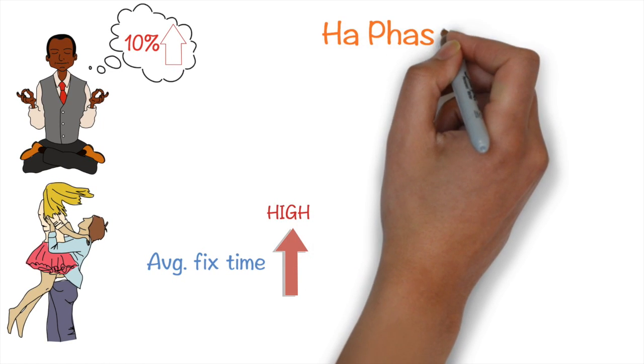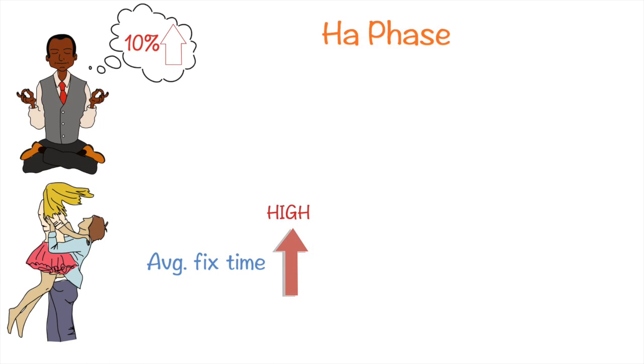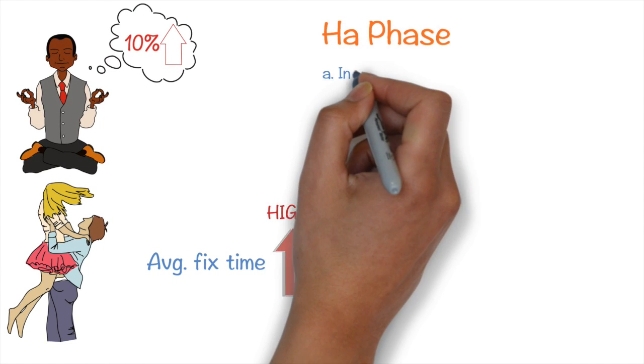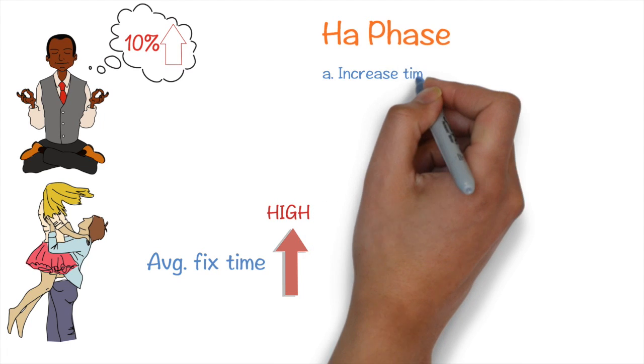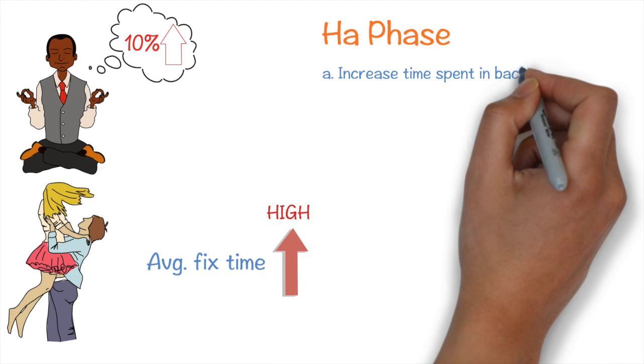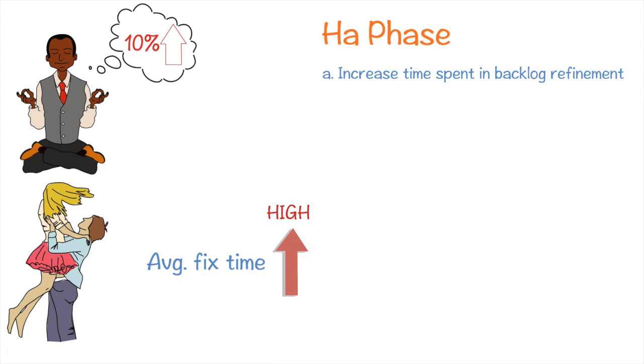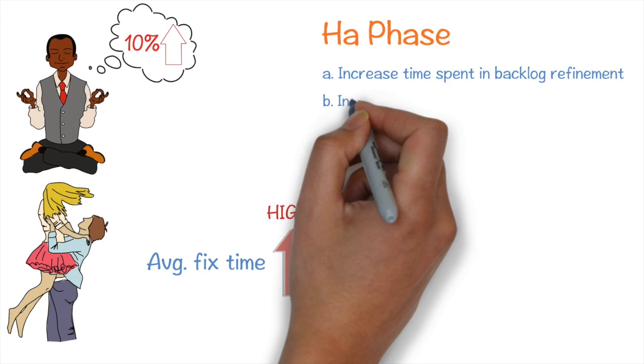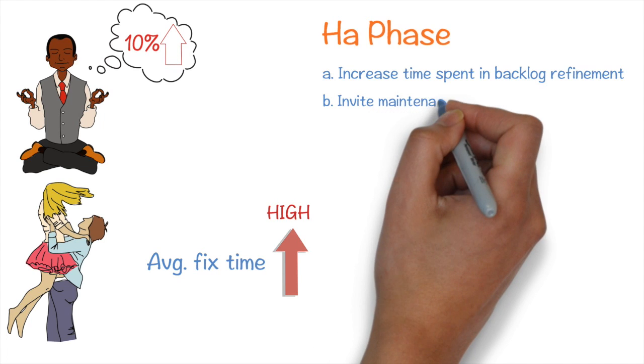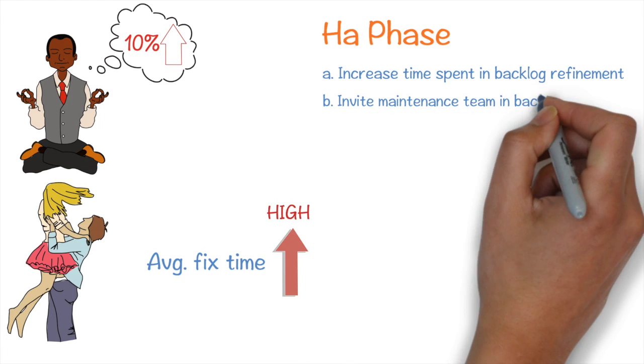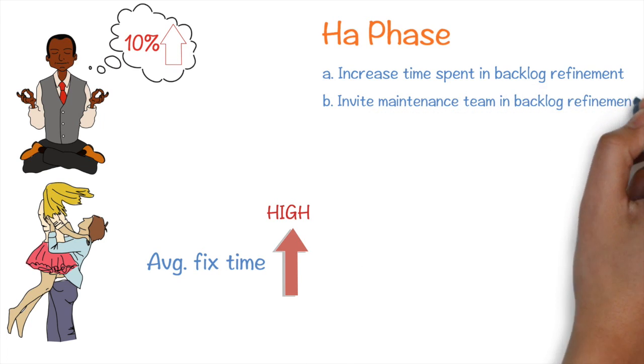Therefore, in the Ha phase, Trade Bull decided to modify their practice by increasing the time spent in backlog refinement and adopting the other team's practice of inviting maintenance team in the backlog refinement meeting.